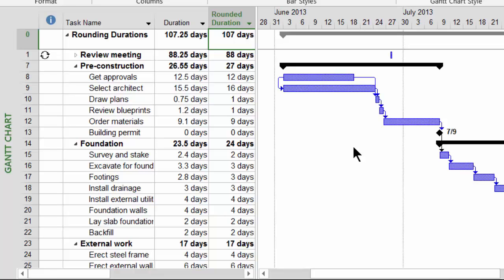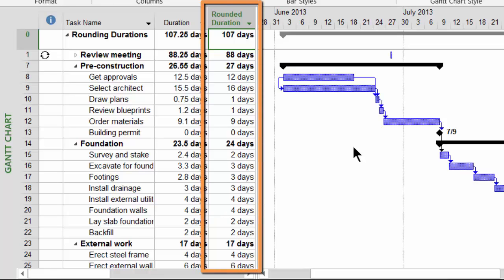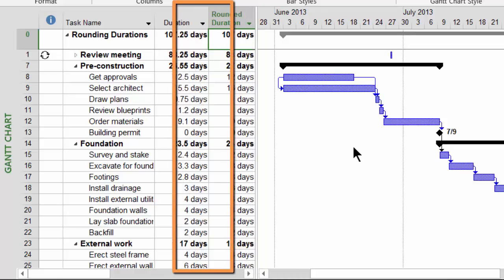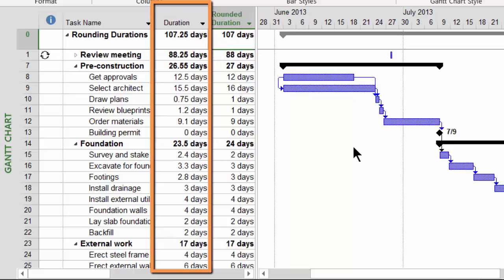Now the only negative to this is that you cannot use the rounded duration column as a means of data entry, because the rounded duration column is merely a reflection of the original duration column.